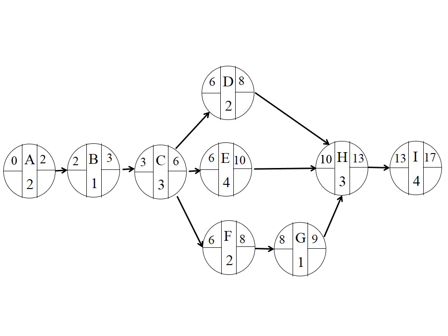If you are not told otherwise, you will assume that the latest you can allow the project to get completed is the same as the earliest completion time for the terminating task. So you will assume 17. But if I told you something else, you will use that number. Anyway, in this example, we will assume that the latest you can finish is 17.